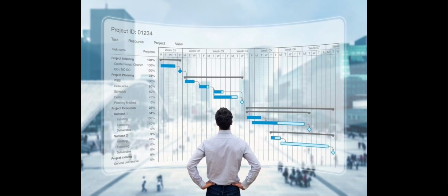I'm particularly intrigued by the CRM example, especially the breakdown of resource costs. It really highlights the importance of considering not just salaries, but also benefits, equipment, and even things like training and professional development. For sure. Those costs can add up quickly if you don't factor them in from the start. Absolutely. And it's not just about the direct costs associated with each role. You also need to consider indirect costs, like overhead expenses, which can sometimes be overlooked. Like what? Things like office space, utilities, administrative support. Those all contribute to the overall project budget.